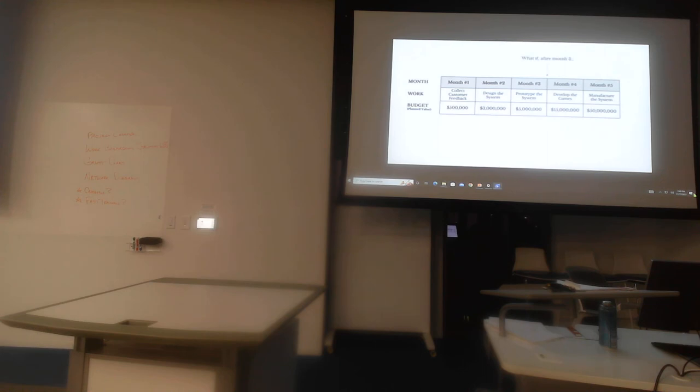Now imagine this. If after month three, at the end of month three, you hoped that we would have gotten collecting customer feedback, designing the system, and prototyping the system done. This is what we plan to have accomplished. But what if you've only got the first two things done? You've only collected customer feedback and designed the system, and you spent $6 million to do that. So you had three pieces of work planned, but you only got two of them done, and you spent quite a bit to get it accomplished. There's a problem here. You're behind schedule and over budget.